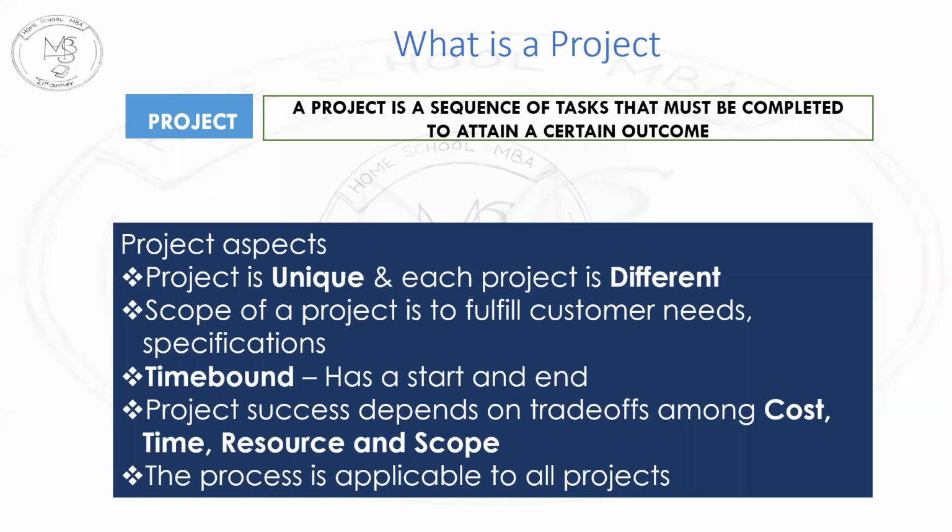But fixing an end date is a very challenging job, because if the project is of a duration of, let's say, 10 years or even 3 years or 1 year for that matter, you are not very sure that you will complete the project by the end date that you fix, because of natural disasters and things like that. Therefore, smart managers build in buffers, 10-15% plus minus, so that at the end of the day, they can say that they completed the project within the time frame.